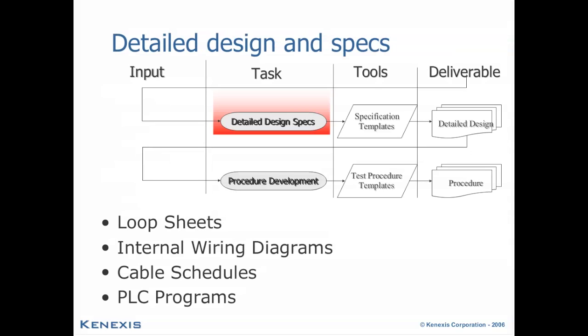Usually, the next step is conducted by separate individuals. There would be a certain demarcation between the conceptual design and the detailed design, and the interface between those two groups of people is the SRS. So the conceptual design is now finished, and the detailed design needs to proceed, based on the requirements in the safety requirement specification.